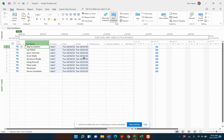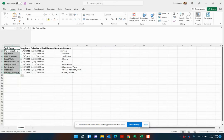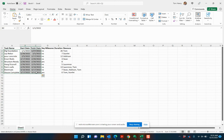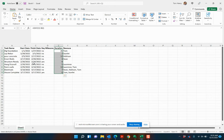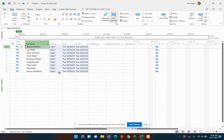What I want next is I'm not going to take the start and finish dates. Remember, I'm going to put in the durations of those tasks. Now you'll notice that some of these are milestones. Structure ready is a milestone. It has a zero day duration. House complete is a milestone. Zero day duration.